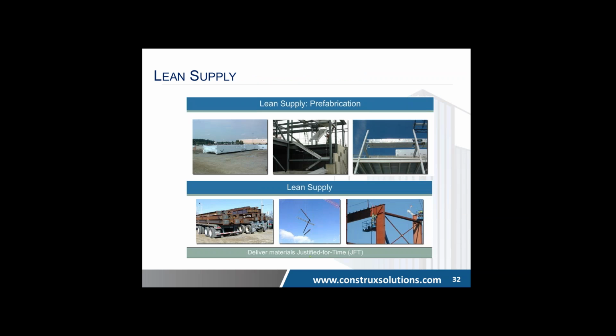Lean supply through prefabrication is one way of decreasing costs. Getting things delivered to the site, put together already, ultimately will lower costs. I've seen times on projects recently where they just didn't have space to lay out all the steel, which impacted concrete, and concrete lost a lot of money, steel lost a lot of money, and then that ultimately sent the project into a delay situation where all follow-on trades were losing money just because of the space constraint that was not thought of. If you put things together and you deliver them to the site in a lean fashion, just-in-time